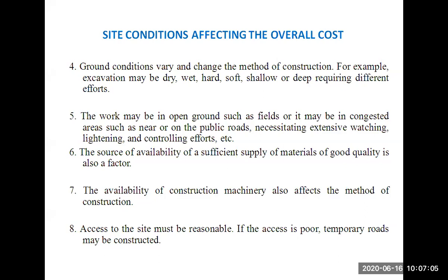Then the work, whether it is in open ground or in fields, or in a heavily crowded area, definitely we will face a transportation problem. Again, it will hamper our overall cost of the project. If our project is 20 kilometers away from our native place, then transportation charges may increase in that case. So again, our project cost will vary.